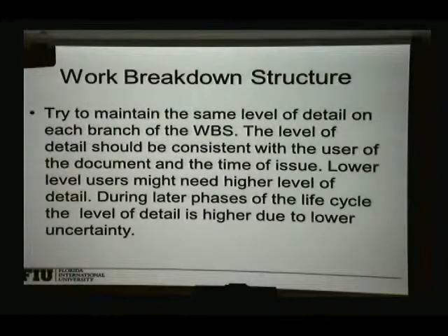So we want to keep the same level of detail on each one of these branches for the work breakdown structure. You break it down to the point where you can describe it, where you can estimate it. That's where you stop. You don't go down to the screw levels, in the door to attach them to the hinges. You don't need to do that. You may go to the level of door, and that's it.